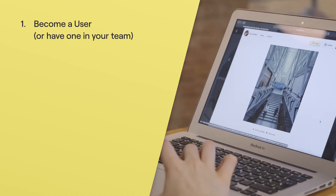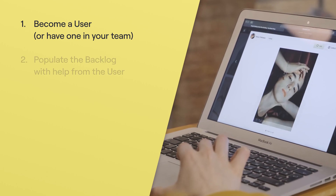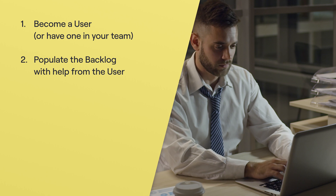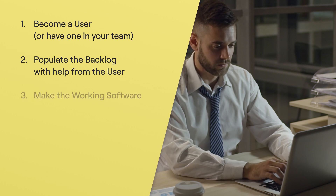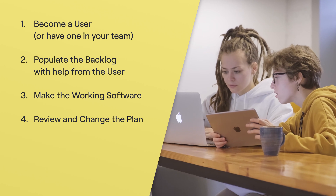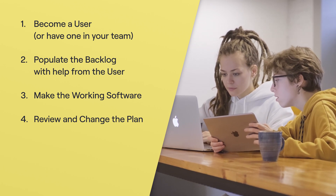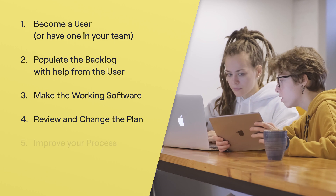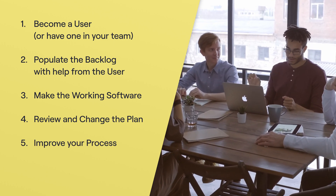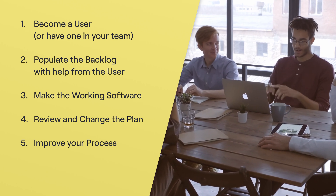There are five main steps to this process. The first one is that you should become a user, or at least have a user in your team. The second is to populate the backlog — the actual work you're going to do in the project — with the help of the user. Number three is the bread and butter of our craft: actual design and coding. Number four is a review, where we show the user what we've done. And number five is to improve your process so that next time you can do things better.